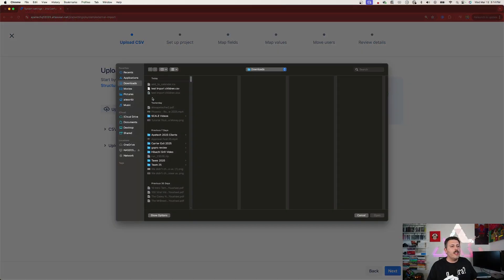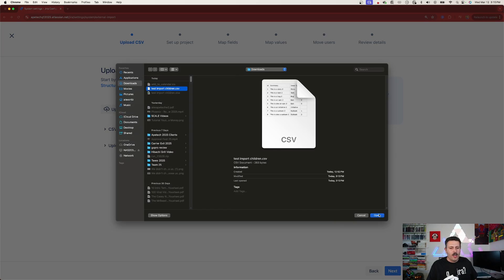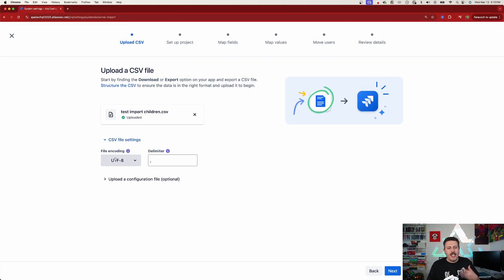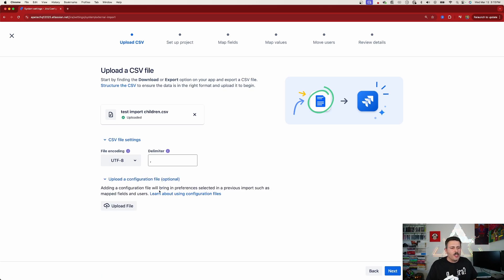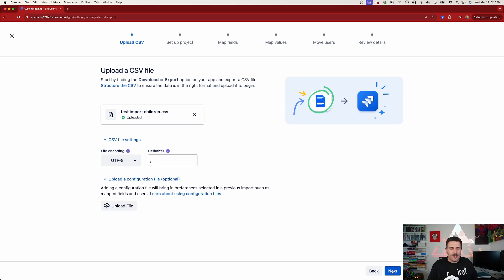Creating a new project is okay in some cases, but normally we want to import to existing projects — in which case you'll want to follow the second half of this video. To proceed, select your CSV file, click Open, then check your settings: make sure you have UTF-8 and a comma-delimited file. We're not going to use a configuration file in this case, so click Next, and then this is where you create the project.